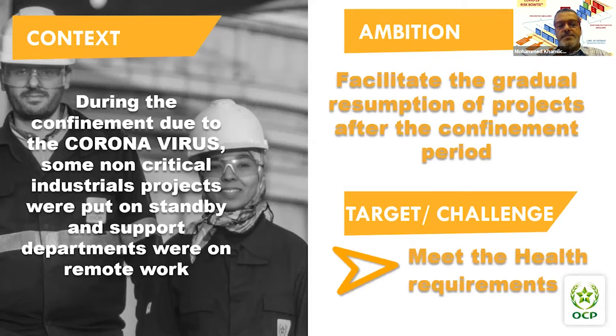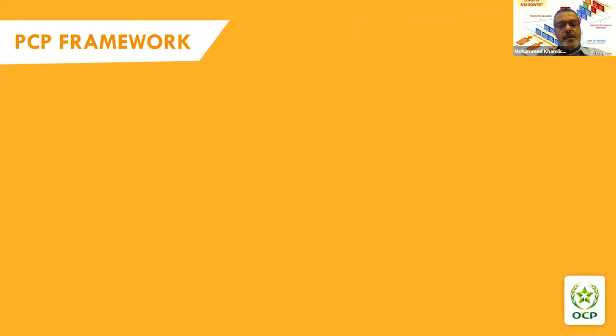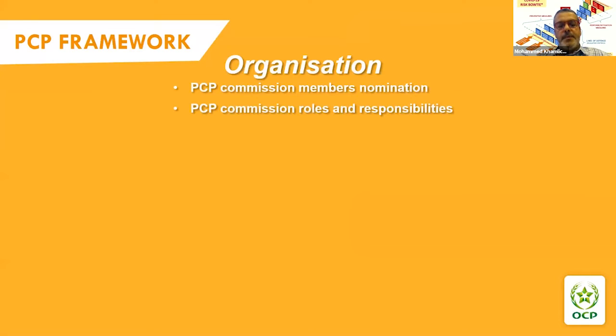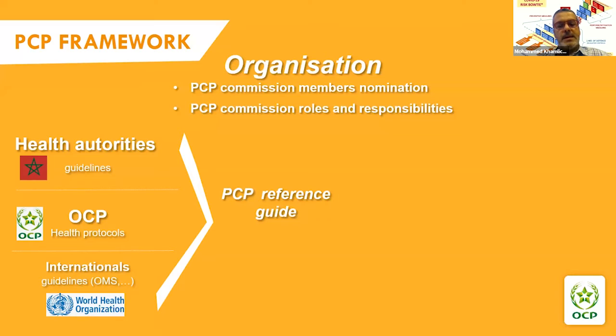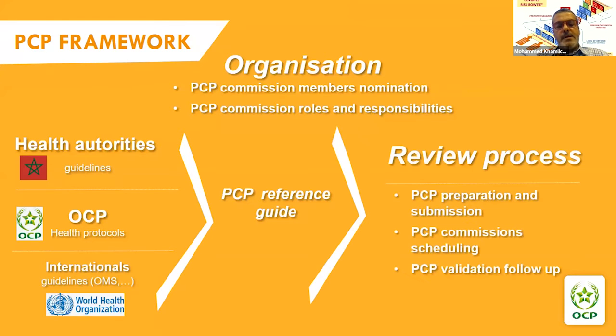Now, let's move to the conception of our PCP process. The PCP framework was set up by defining the organization and the mission of the committee members appointed by the top management of OCP. Then, a common PCP reference guide was established, summarizing all the requirements of the Moroccan authorities, health protocols of OCP, and international guidelines of the World Health Organization. To ensure compliance of the PCPs established for each project with the OCP reference guide, a reviewing and approval process has been defined by the committee's members.